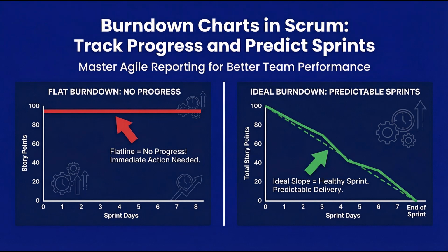When I looked at their daily burndown, not just the final sprint burndown, I saw the real pattern. A flat line for the first 6 days, then a sudden drop on days 7 and 8. That's the hockey stick pattern, and it told me everything. The team was delaying updates, working in silos, and then batch updating their progress. No collaboration, no transparency, no real Scrum.